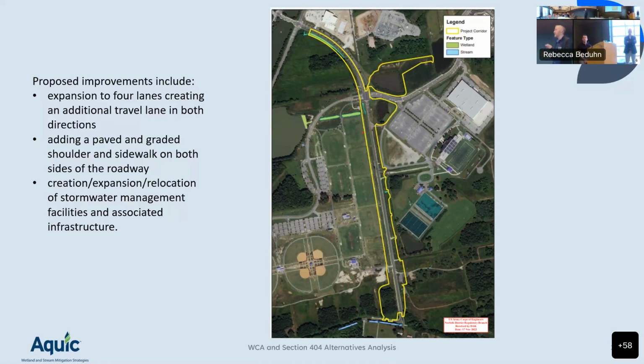We want to repair that. We want to replace that culvert with something larger. It's going to lead to this much more impact. Give us the reason. Lay it out. Okay, we've done our modeling. This is the diameter culvert we need. This is the standards we're going to need for those end slopes. That's how we got to our conclusion.